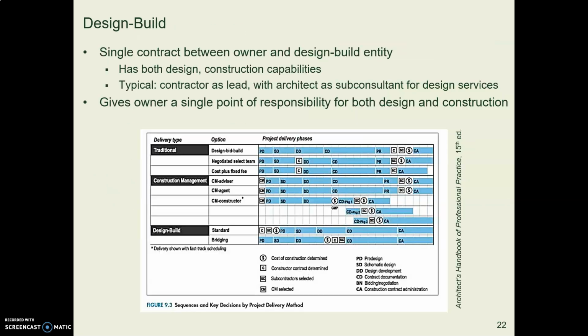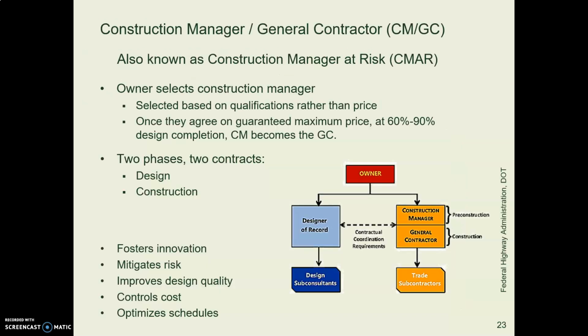Well, there's another approach called design build, where the designer and the contractor are the same legal entity. Often they're the same company. So you don't have to do bidding here because you designed it, you're going to build it, you're responsible for the whole thing. So that's design build. There's another method called CMGC, which does not use bidding. Now, some public entities like LCC use CMGC.